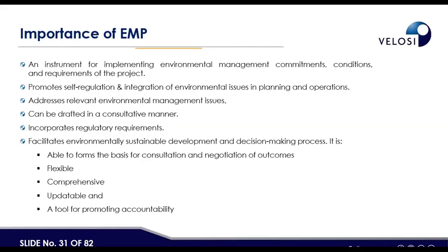Okay, and is this only related to the environmental impacts of construction, operations and decommissioning? Yes, normally these are the life cycle of the project. As I mentioned, there are three kinds of EMP: CMP, OEMP, and DMP. But in some other regions, it's only called the EMP or EMMP, depending upon the stage of the project. If it's only the EMP and it's required before the construction, then we have to cover the construction impacts. And if it's only the operation, then we have to cover the operations.